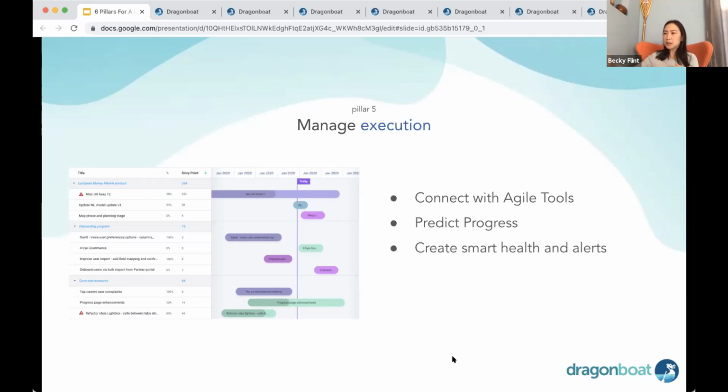As soon as we start to see our previous assumption of how much resource and time this product feature needs may be at risk, we can make a portfolio-level adjustment decision, because you're not just changing that product feature. Everything else in your portfolio is moving, right? If it needs to take longer or take more resources because that's still the most important thing to do, then we probably move some other resources or delay some other product features in this portfolio. If in the end you say, look, it's taking a long time, but we can de-scope it so that we're not going to impact other things in our portfolio, you can make that choice as well.